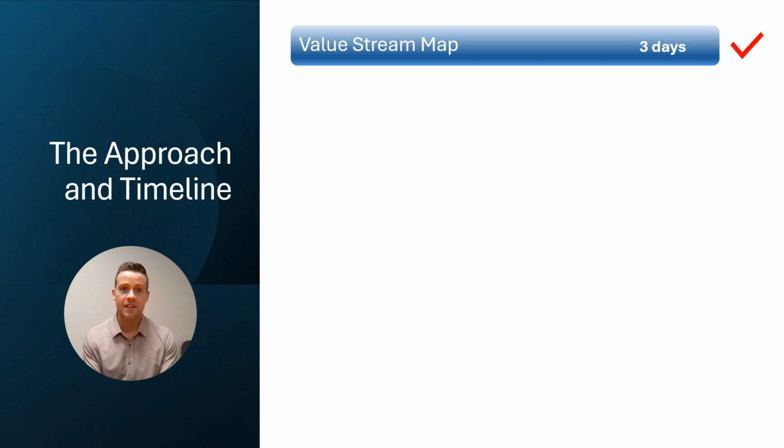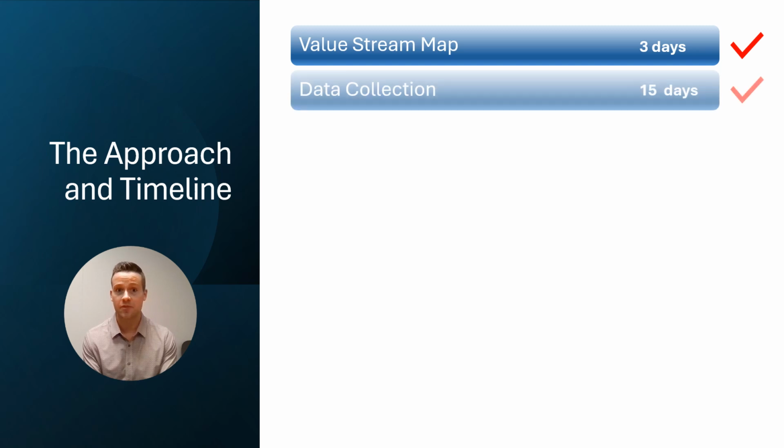Next, we collected baseline data for the identified metrics such as IE labor hours and cost per supply recovery, percentage of purchase order line discrepancies, and supply chain operation satisfaction scores. This data collection took place over 3 weeks and let us establish an accurate current state. We then distributed a customer satisfaction survey to the supply chain operations team to gather feedback on the current process and identify desired functionalities for the new system.